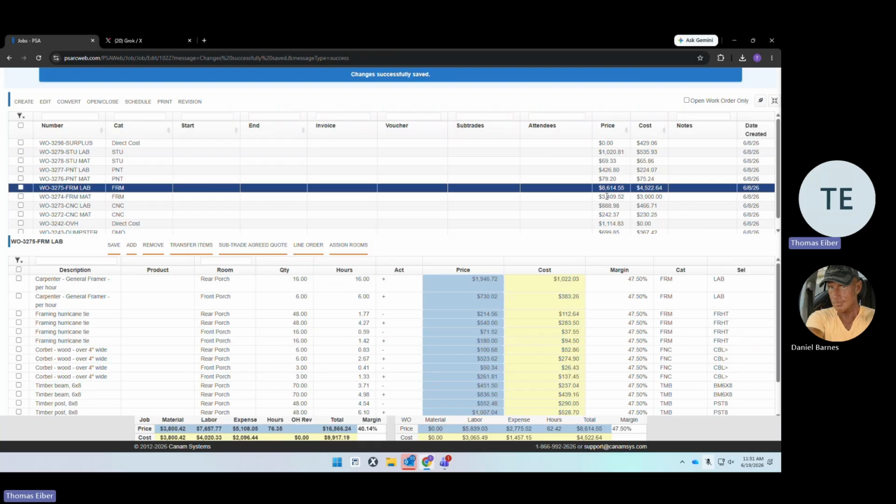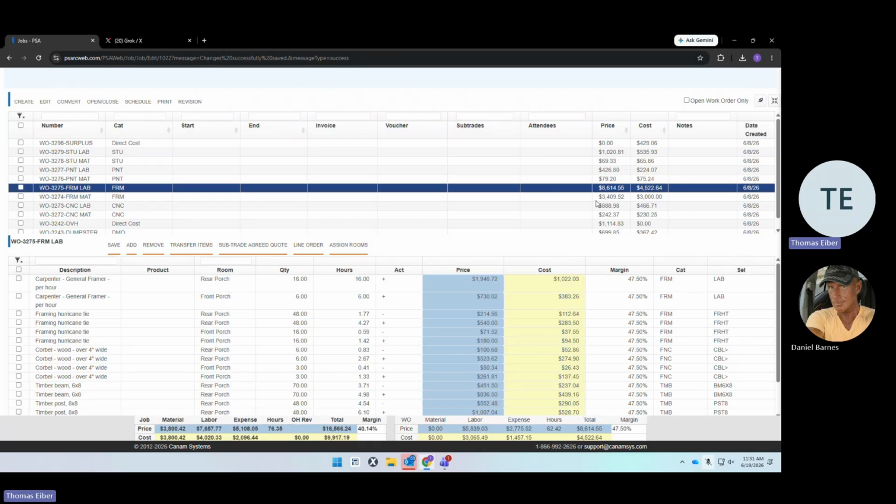In this circumstance, this is a different example. So we're moving on to what we're going to use for an RFP, a request for payment. The idea here is that I've already negotiated a price with the subcontractor, and I've already created an SCA with the amount that I know I have available. I created a subcontractor agreement in Adobe, filled it out, sent it to the subcontractor, and the subcontractor has already signed this amount. Since they signed it, now I can voucher these items.